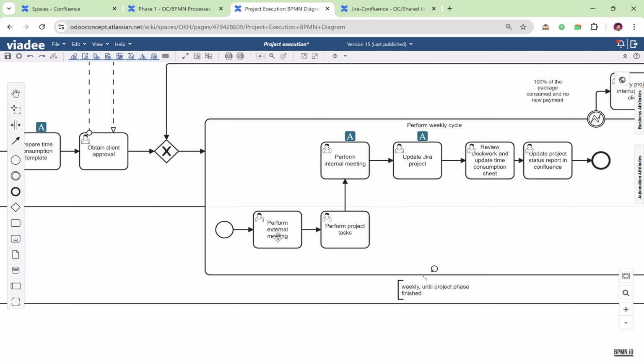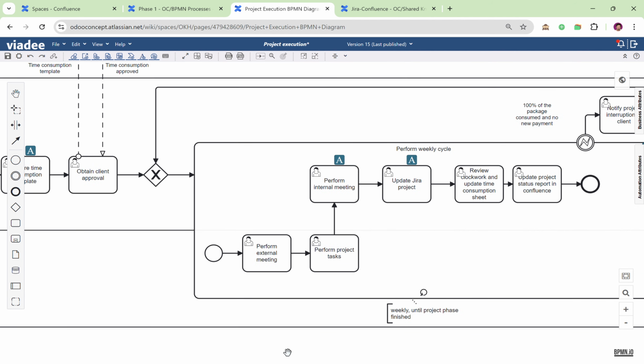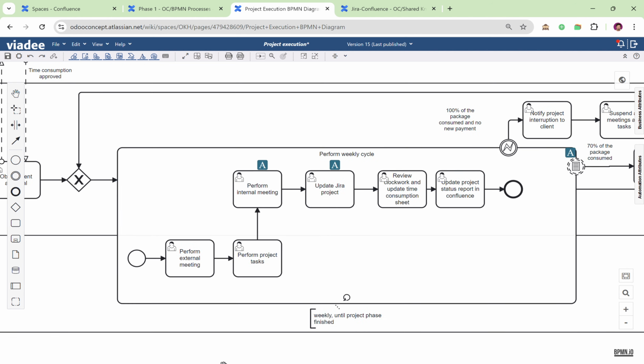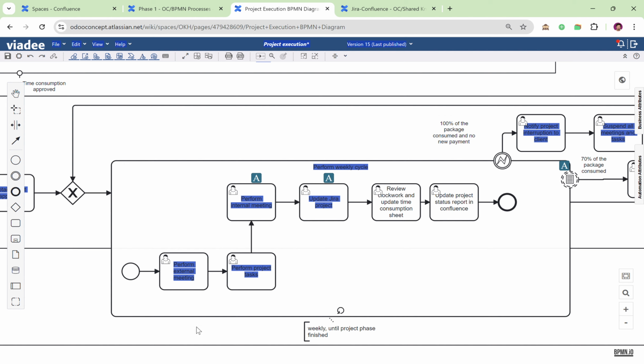The week is the main object in our methodology. Everything starts with the external meeting. In the external meeting, we communicate the objectives for the next week. We also communicate what is still pending from last week's, either from the implementation team or from the client. So if the client owes us something, even if it's data or information or some decision, this should all be considered in the external meeting and should be part of the agenda.